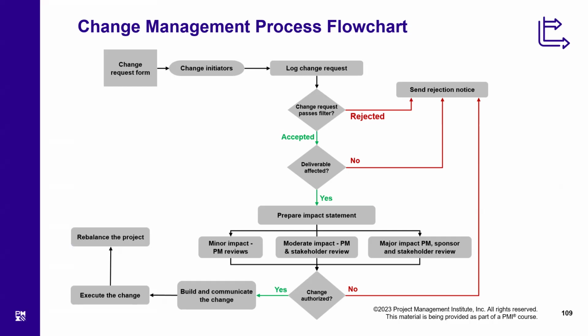project board. Now, after this process, if the change is authorized, that means we have to make necessary amendments in our project management plans, our baselines. This is an indication that because the change has been approved, you are allowed to make changes to your baselines, right? And if it is not approved, the rejection notice is sent backwards. I have shown you this workflow just to show how things happen in a predictive project as far as the change request is concerned.